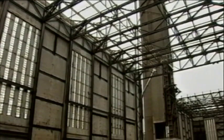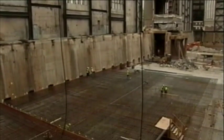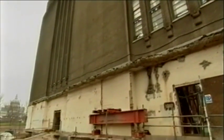Base in Nottinghamshire, all staff are working on fabricating the thousands of columns and beams required. But Rowan's preparations on site get off to a bad start. They've got to strengthen a concrete wall around the base of the building so that it will bear the weight of their steel columns. Drilling through the wall to fix strengthening plates under the columns turns out to be a nightmare.